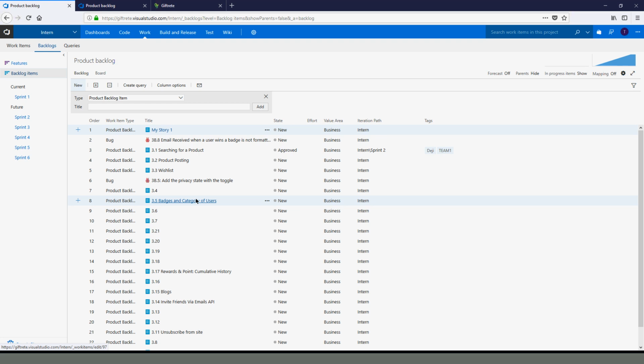So that's even within the team. Then you also go back to the team and look at what the test cases are of everyone. So let's say Gloria has 3.1. Gloria is to ensure that 3.1 is finished, but it's going to be a collective effort for 3.1 to be finished. Everyone has to write their own test cases for 3.1, but it is the responsibility of Gloria to make sure 3.1 is finished and also to review other people's test cases for 3.1. The same way for the one that's on 3.2, so that you'll be able to share your experience. You can learn from that. So that's on your team.